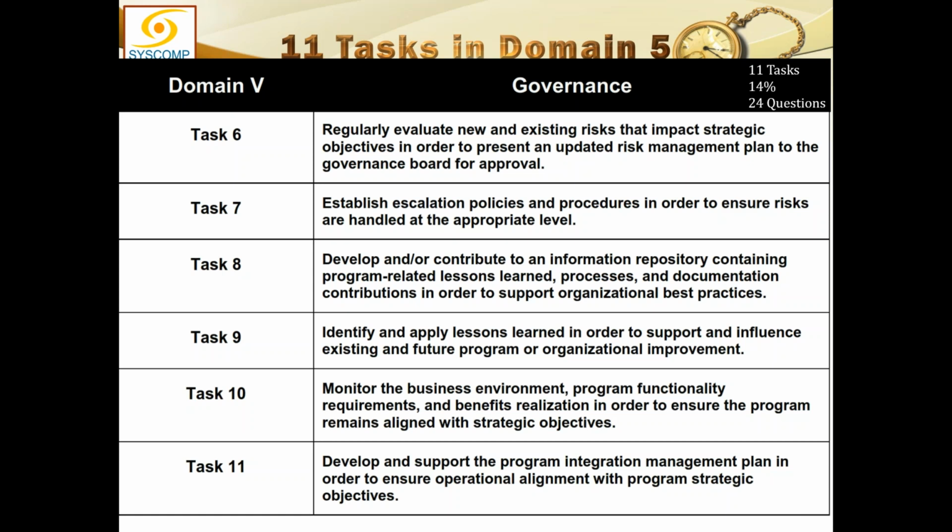So risk management is only applicable during the life of the risk, when the risk was unknown and it did not occur. Uncertainty will only be at that point. As soon as the risk occurs, it is 100% certain that it has happened. And all the actions to be taken beyond that point are issue management. So, first I'm talking about the risk escalation.